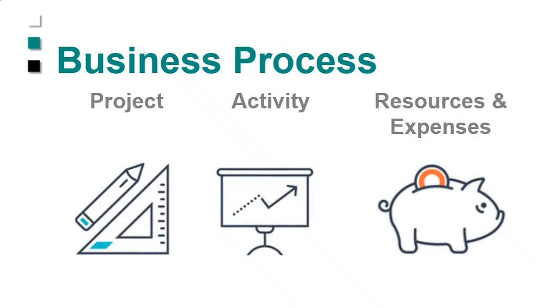Now, for our business process, you can, of course, in the P6-QA tool, check things like project scheduling, data date versus the scheduled dates. AFEs, maybe you don't have a way right now of monitoring the approvals. You can in the business process. AFEs obviously must be approved before the work starts. You need to monitor that.